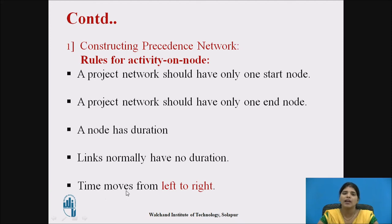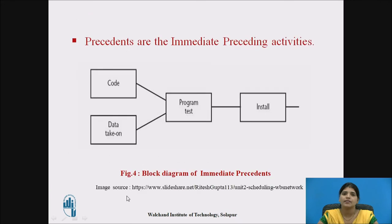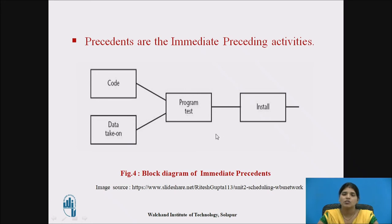Time moves from left to right. The next rule is that precedences are the immediate preceding activities. For example, program test cannot start until the code and data takeon have been completed, and install cannot start until the program test has been completed. So code and data takeon are the precedences of program test, and program test is the precedence of install. This is the block diagram of immediate precedence.